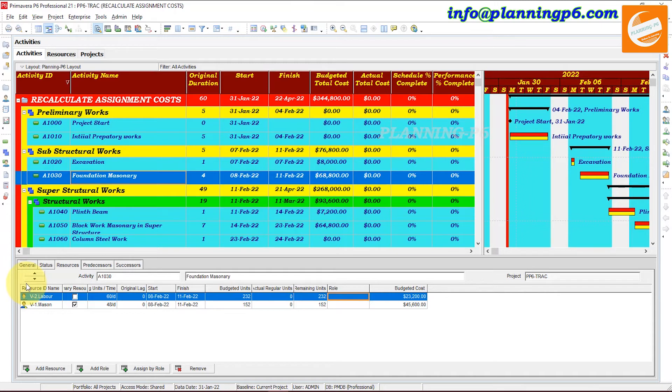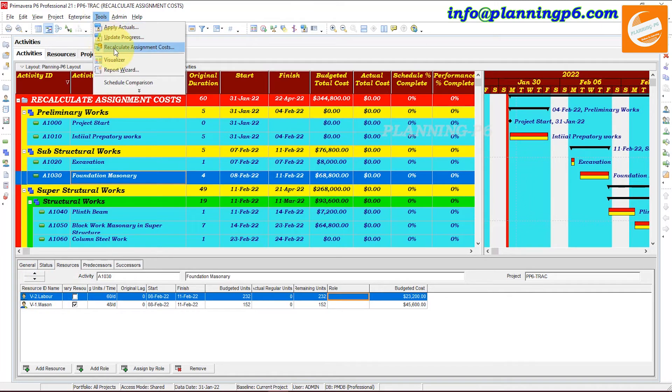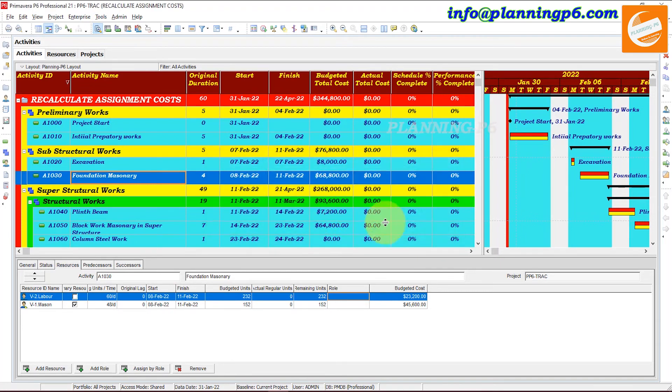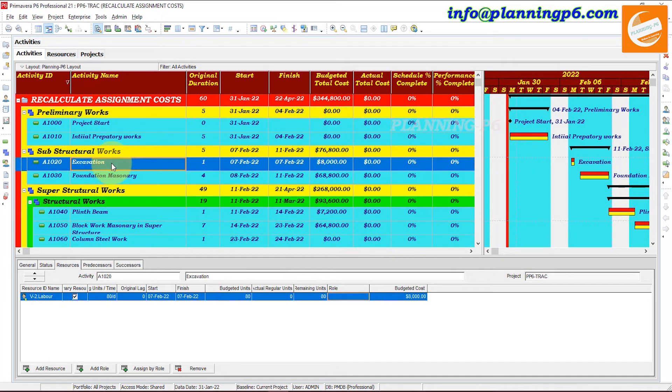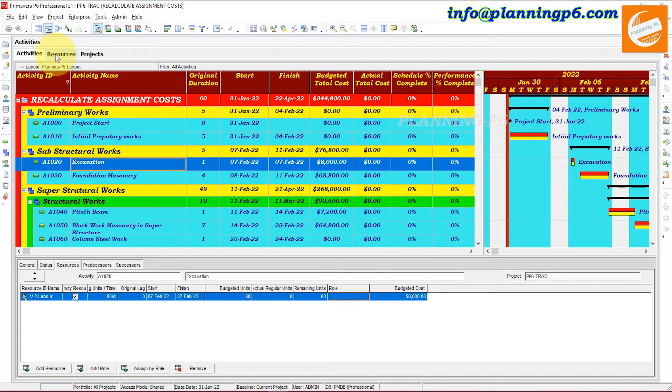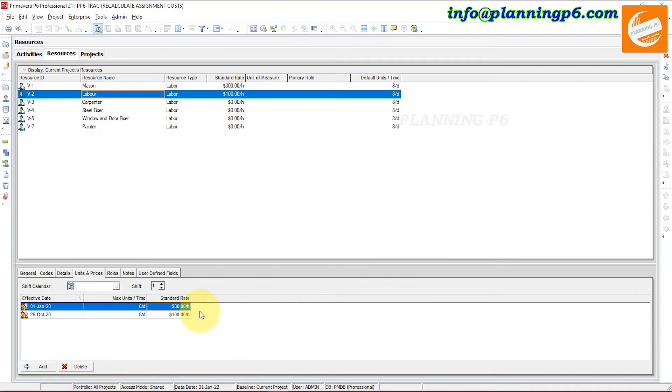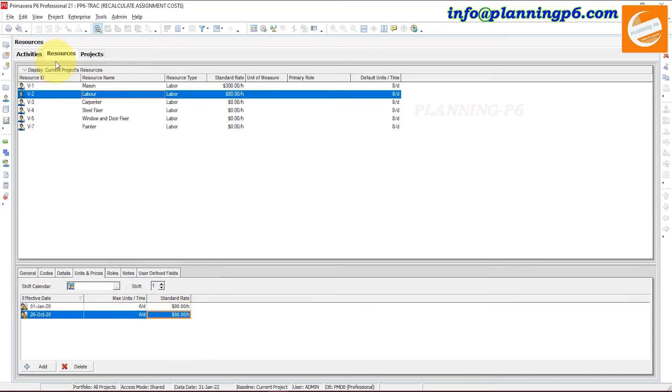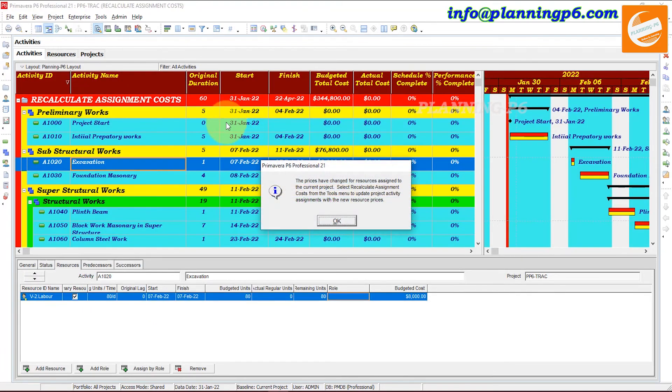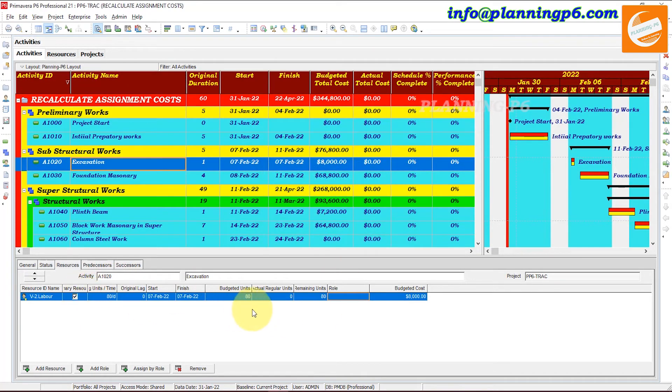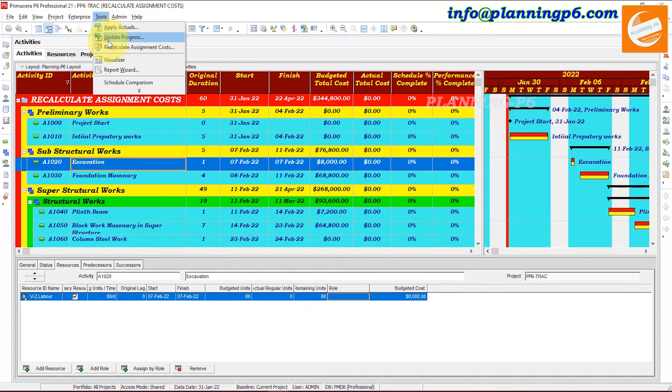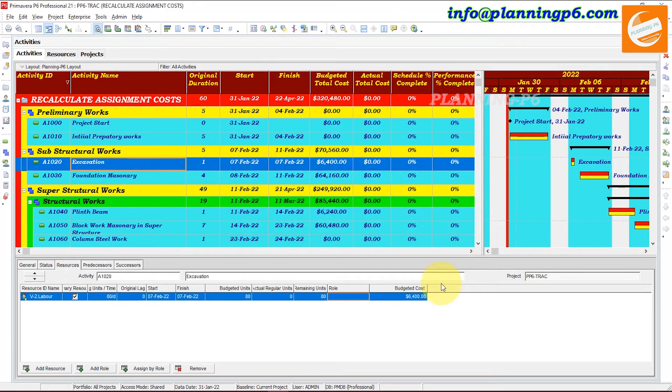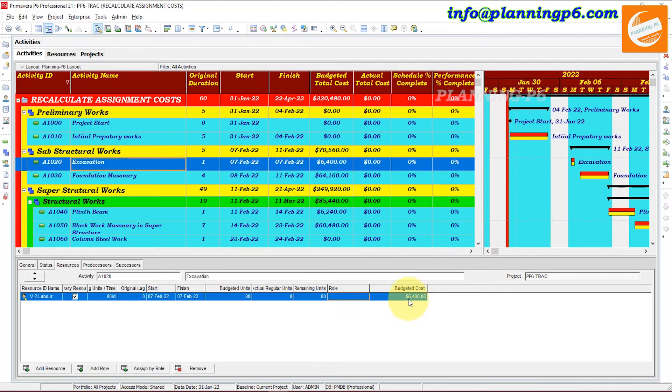Again and again, after a single change you have to change the assignment cost for all. So here go to the resources and update as well. This one, 6 hours per day and 80 dollars per day. OK, go to the activities and here you can see 8000 dollars. Tools and recalculate the assignment cost. Recalculate.